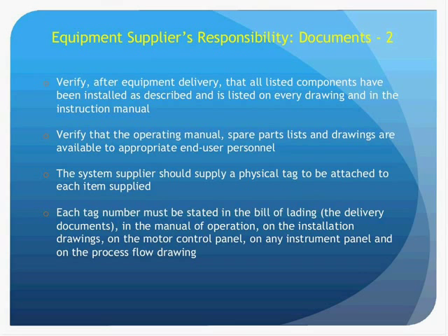The supplier did identify in each of the 2 proposals every item that was to be installed at each end user's facility. The system supplier outsourced the installation portion of their contract to a separate company, but they were responsible for the installation. The installing company neglected to install one identical critical item in each facility that had been received on site. But no one informed either end user that the critical item, which was an inline static mixer, had not been installed.